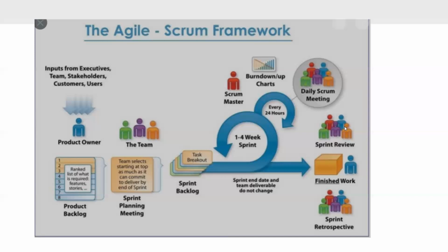At the end of the sprint, there will be a sprint review. What the sprint review does is give the team an opportunity to showcase their work through a demo. As an example, the first task that we saw here was a request from the business saying, I want a new payment screen developed within the user interface, meaning in a website. At the end of this, they could present a demo of the front screen, right? They could present that to the customer and get feedback sooner rather than later, so that they can ensure they accommodate any changes for the following sprint.